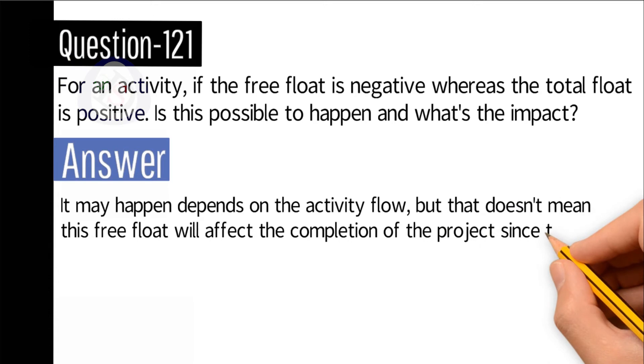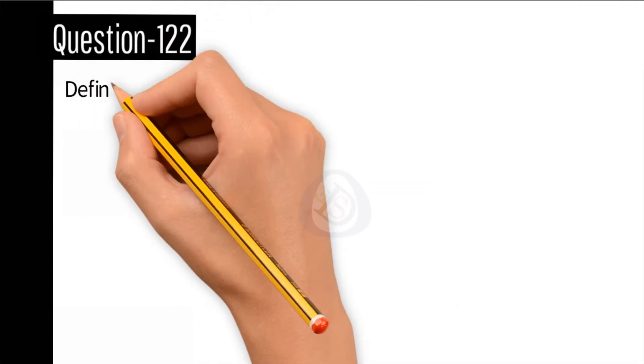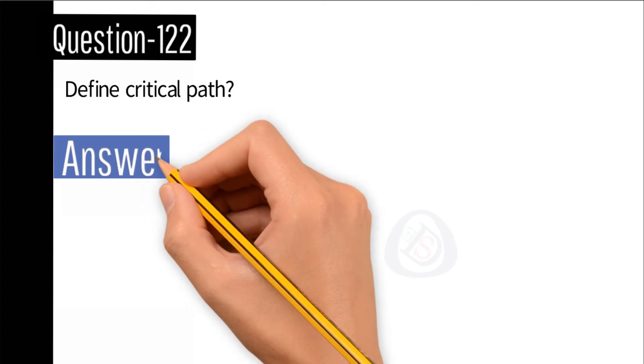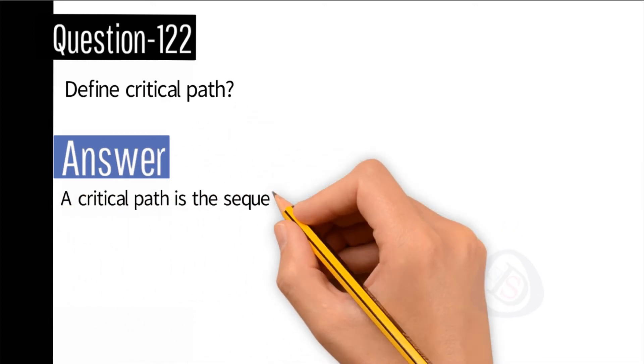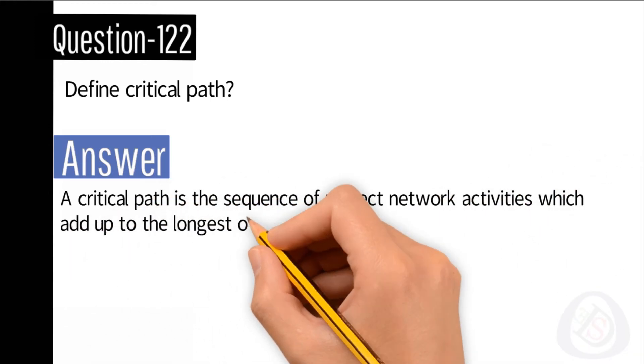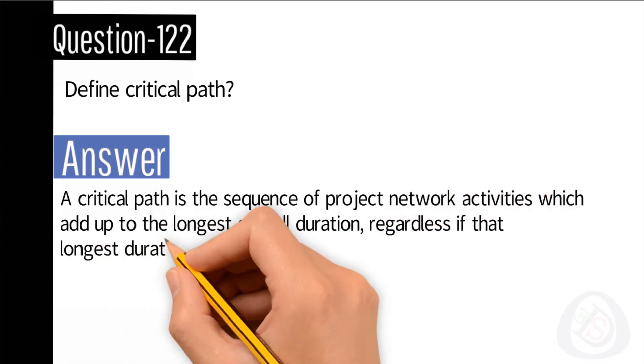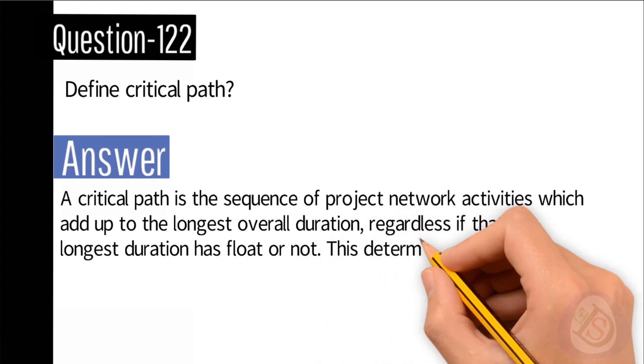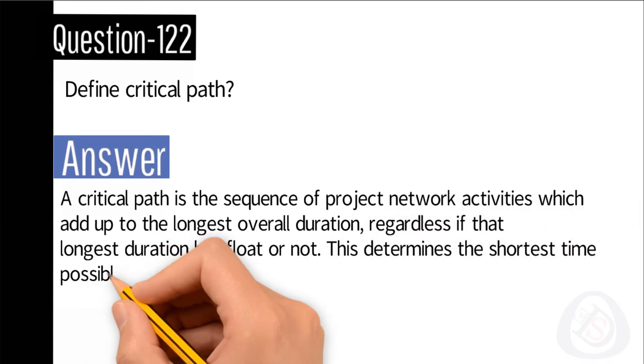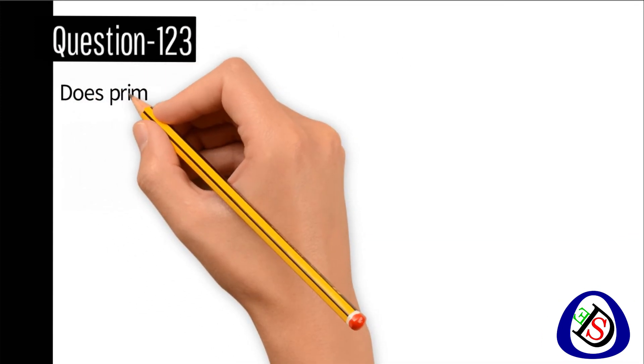Question number 122: Define critical path. Answer: A critical path is a sequence of project network activities which add up to the longest overall duration, regardless if that longest duration has float or not. This determines the shortest time possible to complete the project.